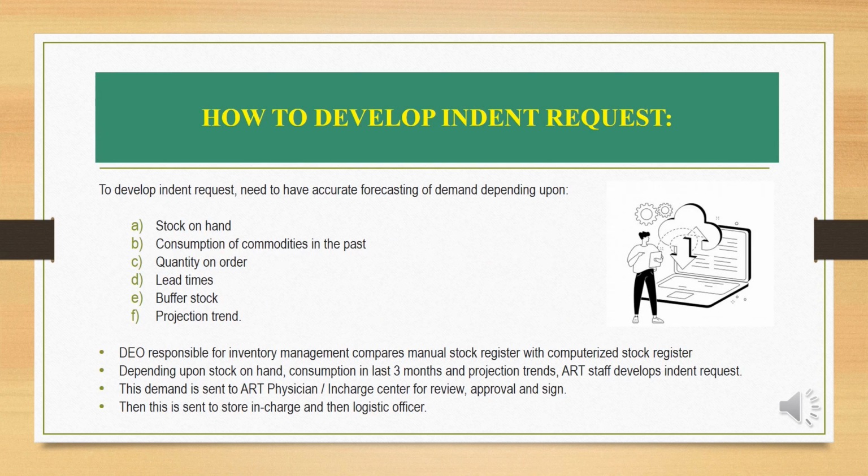How to develop an indent request? To develop an indent request, you need to have accurate forecasting of demand depending on stock on hand, consumption of the commodities in the past, quantity of the stock order, lead time, buffer stock, and projection trend.